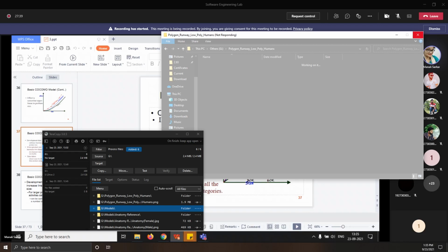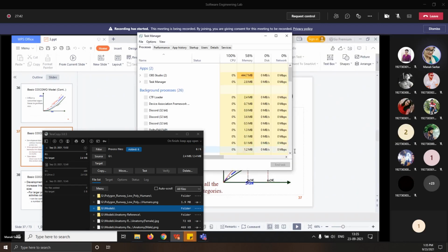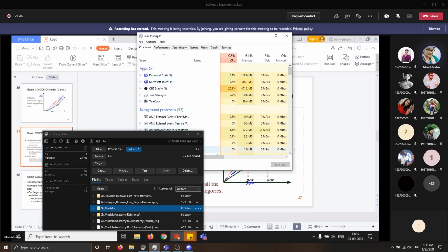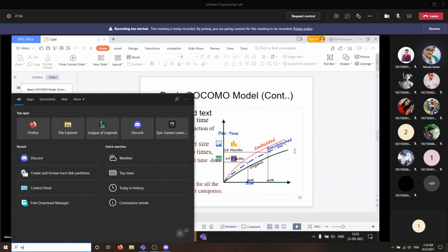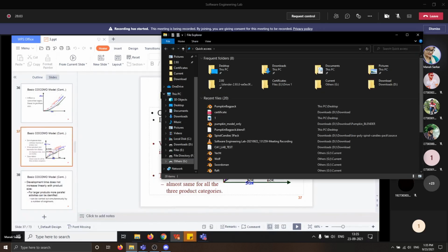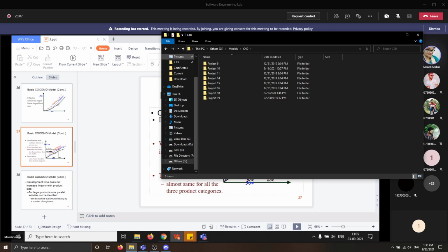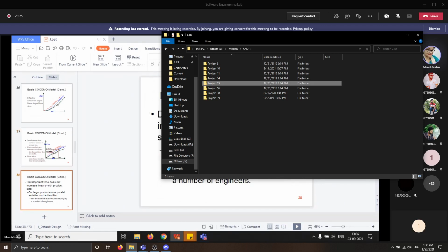It is important to note that the effort and duration estimations obtained using the COCOMO model imply that if you try to complete the project in a time shorter than the estimated duration, then the cost will increase drastically. Yet there is almost no decrease in the estimated cost value when more time is allowed. So the computed effort and duration values are actually the values for doing the work in the shortest time without increasing manpower cost. This is actually the basic focus.